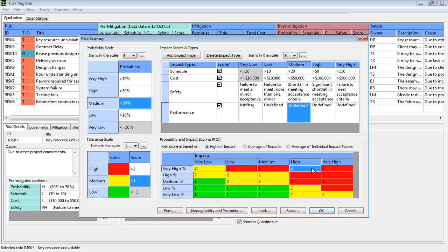Now, we're going to take it a step further because an unacceptable level of schedule risk, we don't truly know until we model it in the schedule and see how that impacts us relative to float and everything else. Something in this yellow section, something in the green section in theory, depending on the float, could hurt us more than something in the red. But this gives us a good indicator as to whether the risk is at an unacceptable level or not.